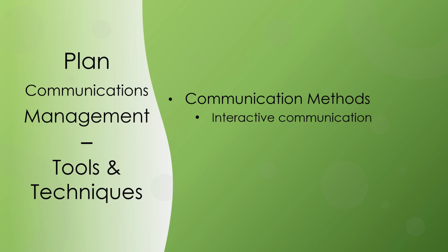Push communication. Sent or distributed directly to specific recipients who need to receive the information. This ensures that the information is distributed, but does not ensure that it actually reached or was understood by the intended audience. Push communications artifacts include letters, memos, reports, emails, faxes, voicemails, blogs, and press releases.